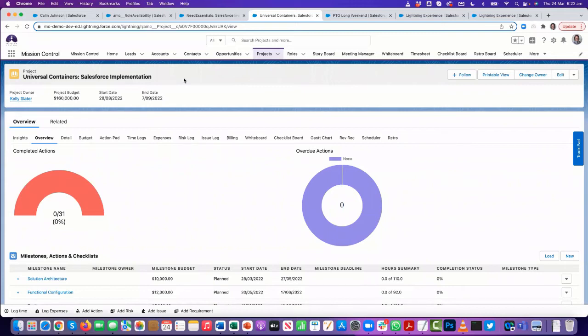So what you can do is use your role forecasts to, at a really high level, just book them out for this project. And that still allows you to keep building the detail of the sprints as and when you're working through them.